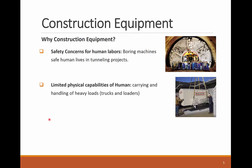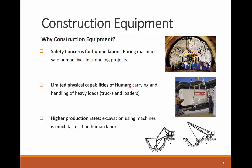The third reason for using machines is their high production rates. Machines don't experience fatigue like humans, and they produce much more work in an hour compared to a completely human crew. For example, the bucket of the shown dragline can carry up to seven or eight cubic yards in just one load, which translates into incredible hourly production rates and low unit cost.